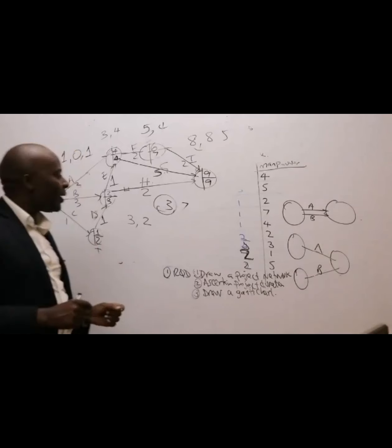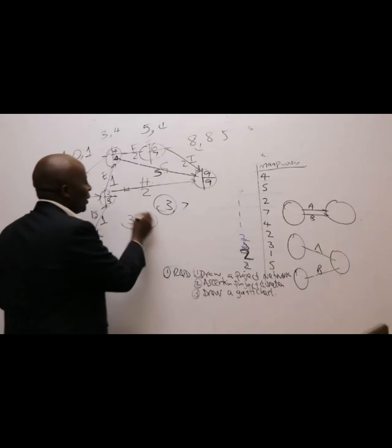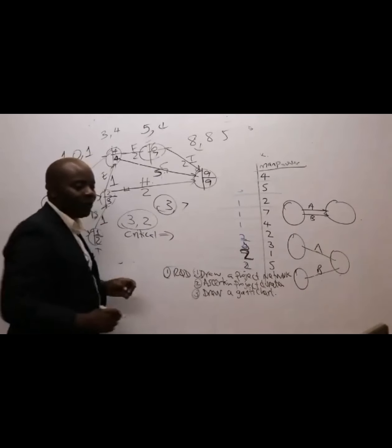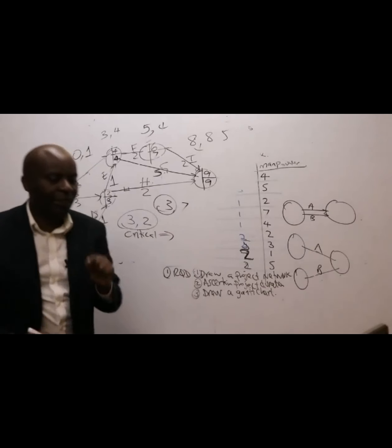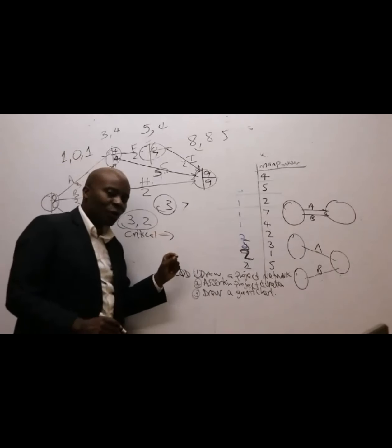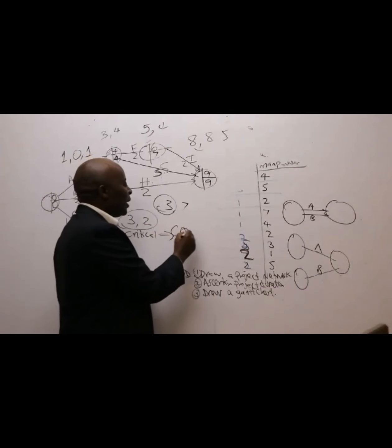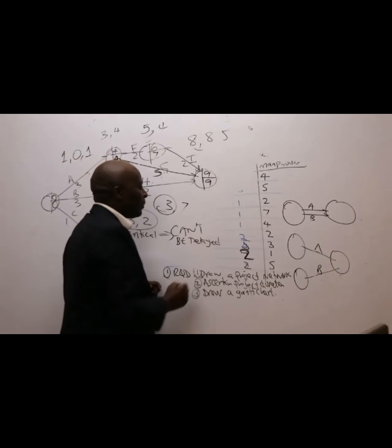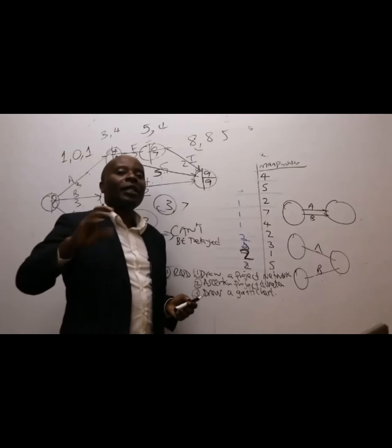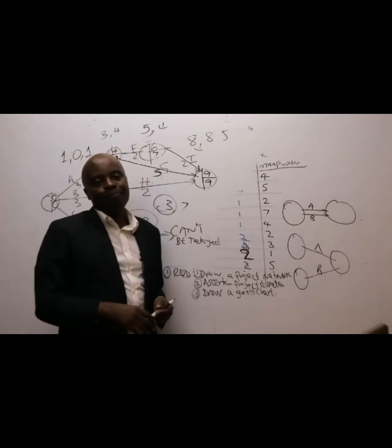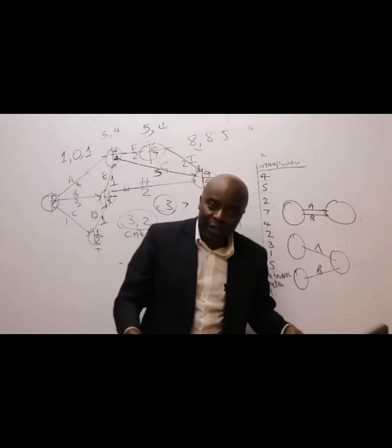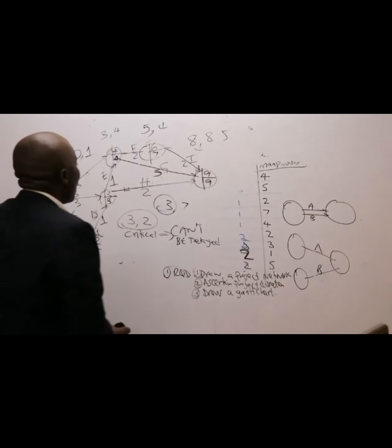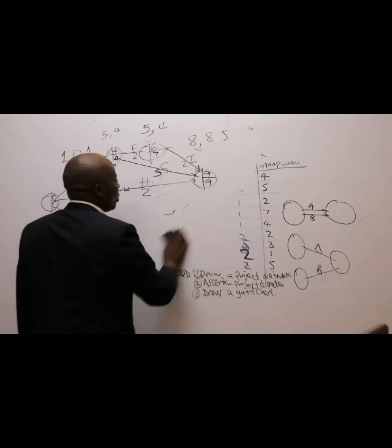Even Nedi has gone ahead to identify the critical activities, wanafunzi wageni. Critical activities are those activities that cannot be delayed. Those activities that are so special to us. That's how you define it in an exam: those that can't be delayed. If you try delaying them, automatically you will delay the project's completion time. If you delay them, then the entire project will be delayed. So the question is, how will you be able to identify those critical activities?